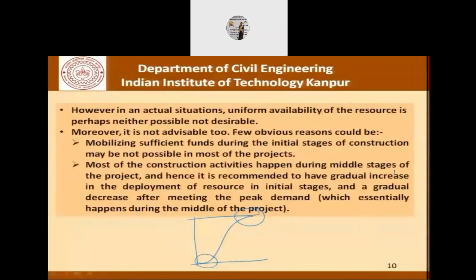What I'm essentially saying is, if we differentiate this total progress with respect to time, what we'll get is a progress curve. So this is our rate at which the project moves. If the project moves gradually in the beginning, reaches a peak at the middle stages, and then goes to 0 once again, what we will get as the cumulative progress is what is given in blue.